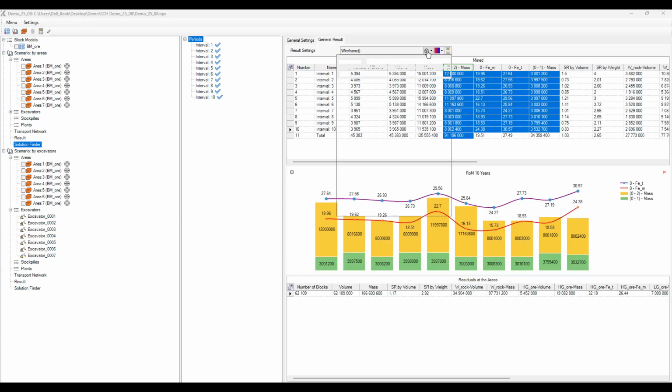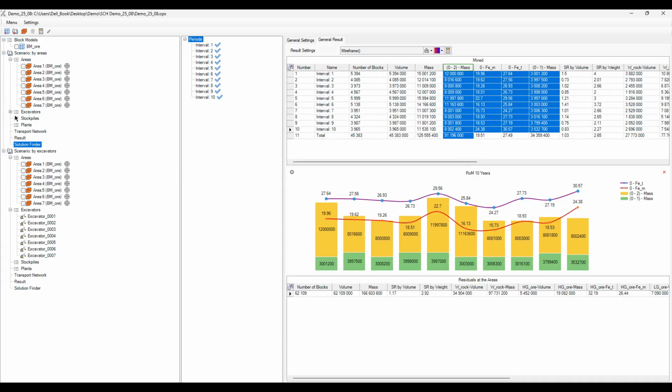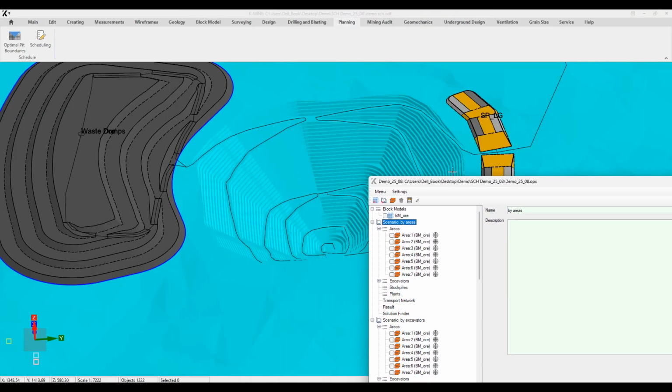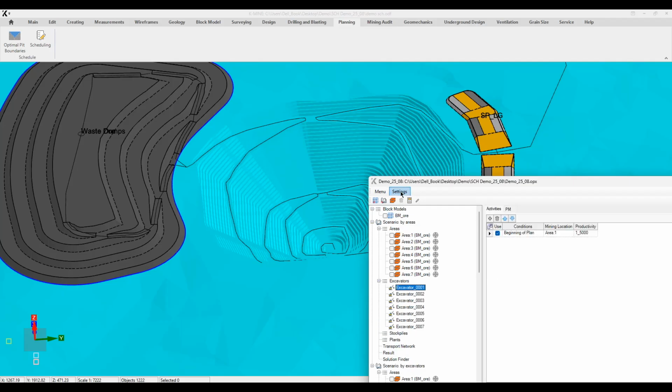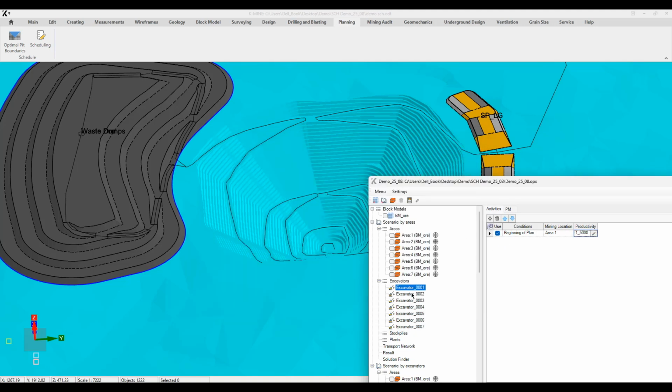Now let's look at a more manual, more detailed approach. The next approach is applicable across planning timeframes and can be used in all cases. Here, we decide when and how much must be mined from each area to meet our targets. We use extraction units. Here, they're abstract, representing mining intensity per area, and we adjust that intensity manually using events. In practice, you set the required productivity rates for each area in a given time period and use that for planning. For analysis, view the charts.